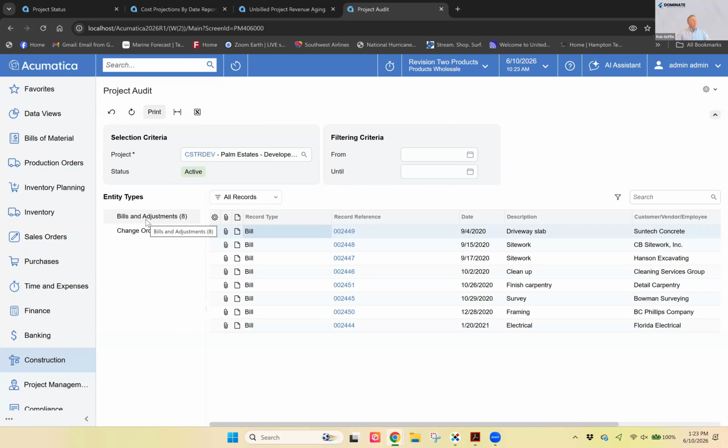Yeah, and it seems like it's always on the AP side and the time entry side. That's where the missing data is, what's being missed. It's hard to track down AP because those supplier invoices can come in at any time, and if those go to the accounting department, if I'm a PM, I'm not going to see it until they get it in the system. The first step to get it in the system is not a released transaction, so it's not hitting my project budget. I don't know that it's there yet.